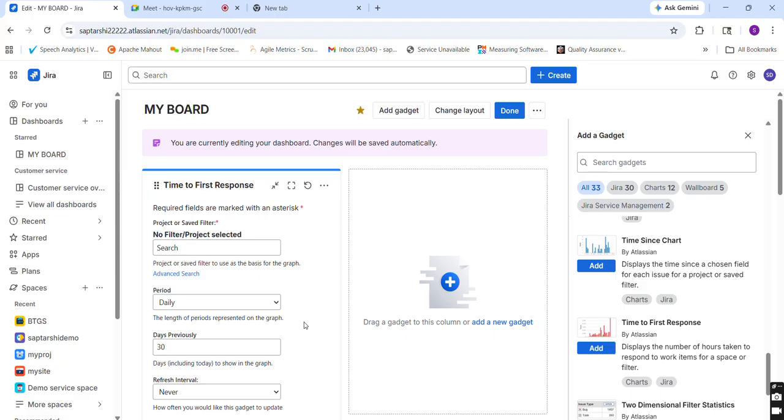If you go for the root of this task, what is the hierarchy of the agile? The first is an epic, then product backlog, then sprint backlog, then user story point, and then you can go with the proper estimations according to the user story point, depending upon the complexity of the user story. One user story of the sprint is ideally 4 hours minimum and 8 hours maximum.